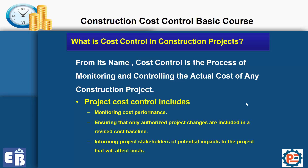The difference between cost control in the planning and controlling area and what the accounting department does is that the accounting department can tell you whether or not the project completed on budget — but only after an item is 100% completed or even after the whole project is finished. Whereas cost control gives you alarms from day one, and in this course we'll discuss how you can simply do it yourself.